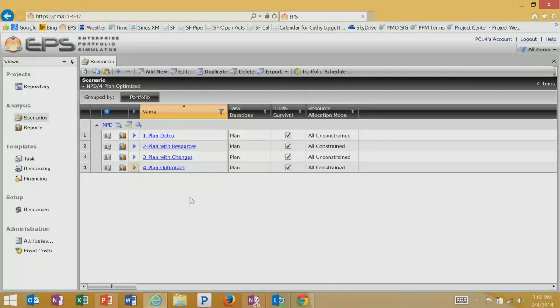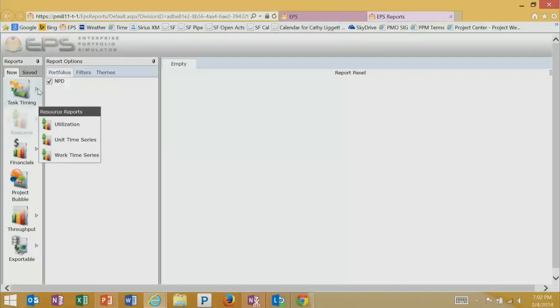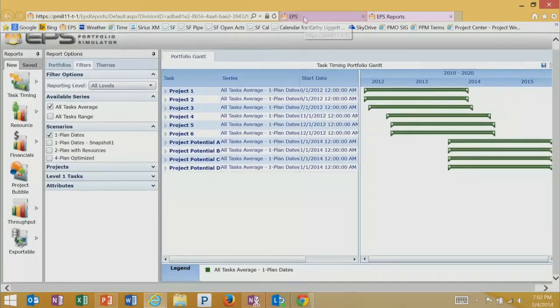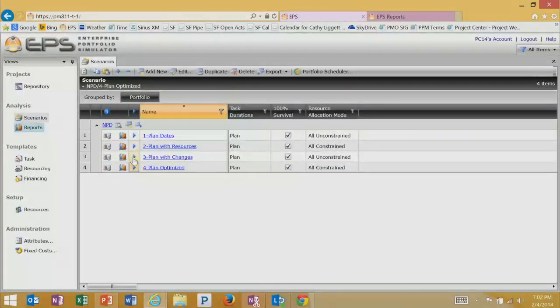It's important to be able to do a total capital cost, but also be able to look at costs over time, because people typically have a budget in time chunks. And just to say, well, what's the total cost of my project? But my project's not finishing for 3 years, so I'm trying to unroll that cost over time. There's kind of a shortfall there that we try to fill by doing costs over time as an option. Let's see, other questions? Yes.